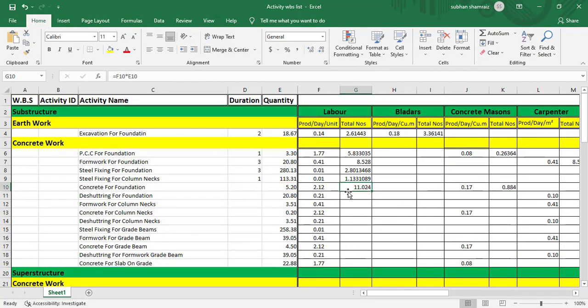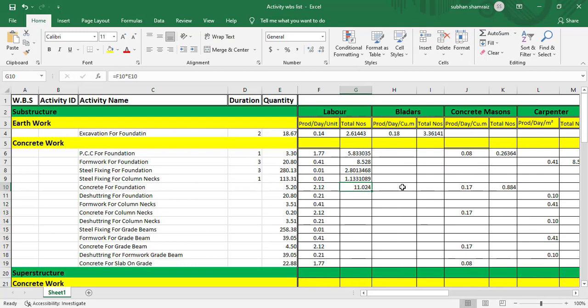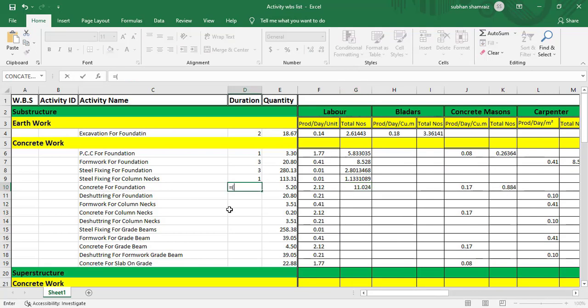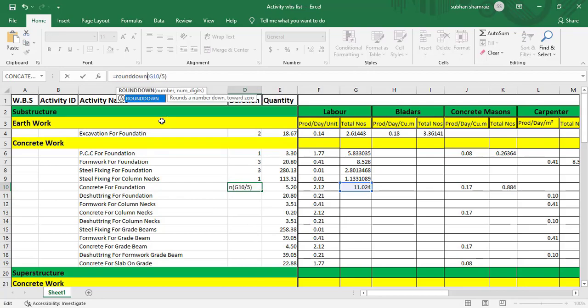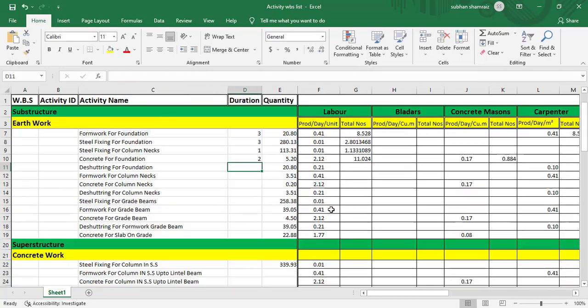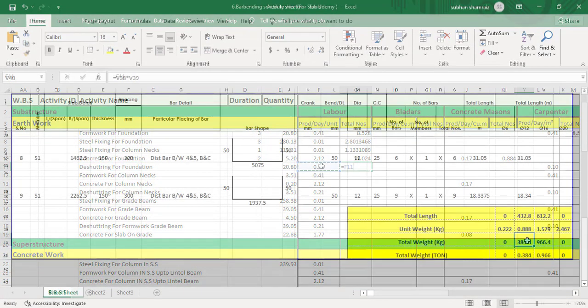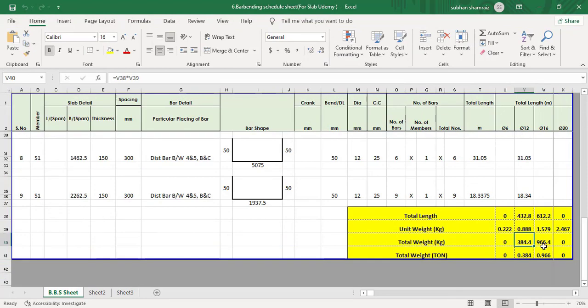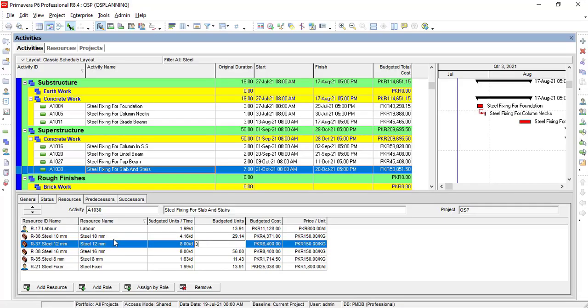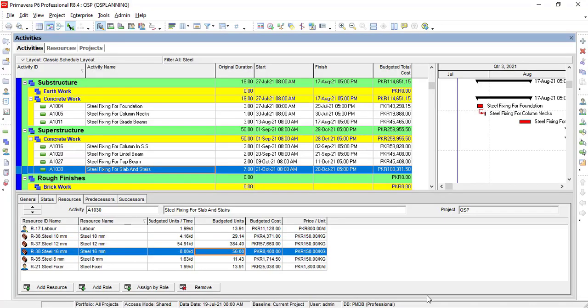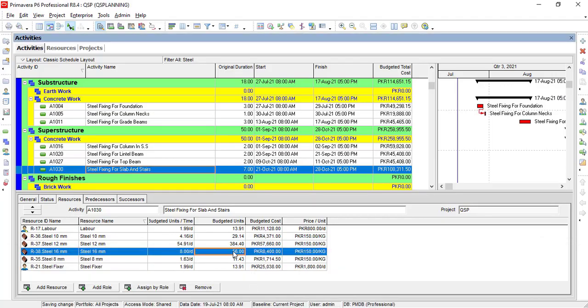We will find out duration of each and every activity based on quantities and the productivity. We will create WBS, work breakdown structure, for our project in Primavera. We will give relationship to the activities based on logic.